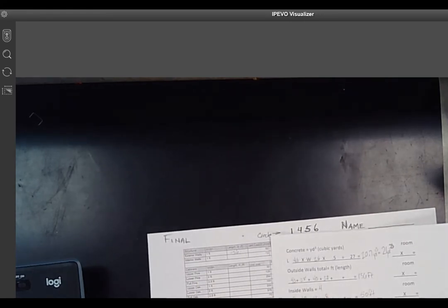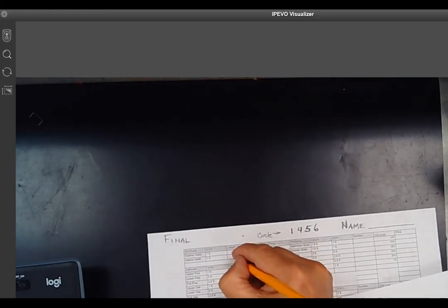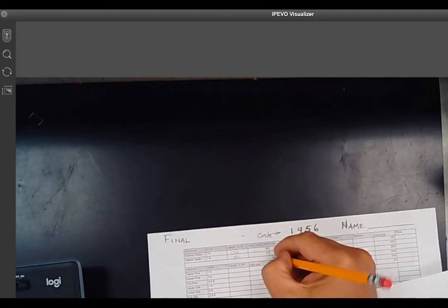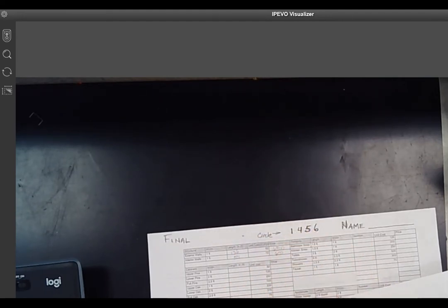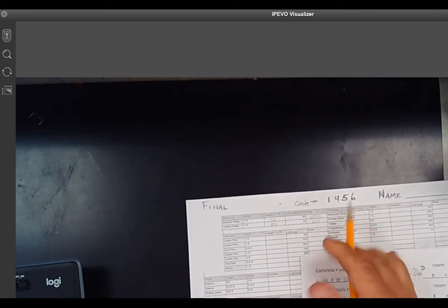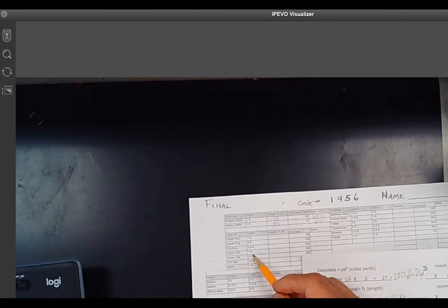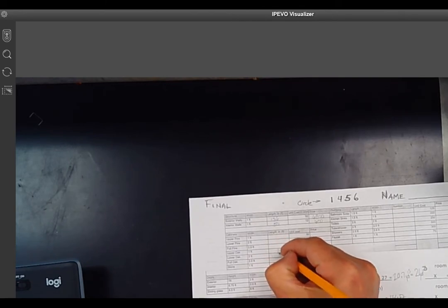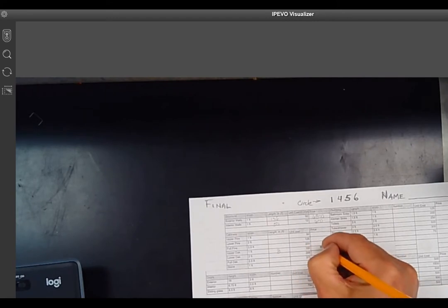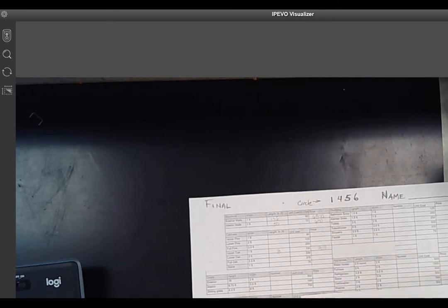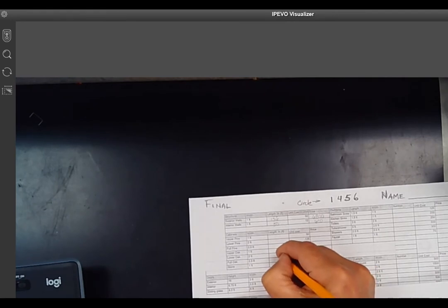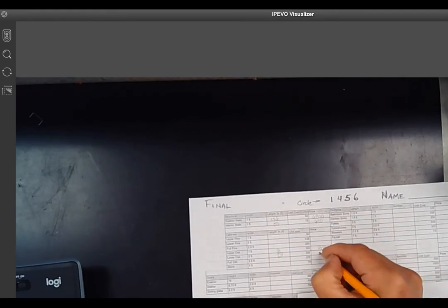Interior walls, there are 50 feet. 50 feet times 12 equals 600. Now, I'm going to do my cabinets in oak. So go down here to oak. Now, I don't have anything here, so I don't have to fill anything in. But oak uppers, I had 8 feet of those. And 8 feet is $800. I had 29 feet of these. That's $5,800.